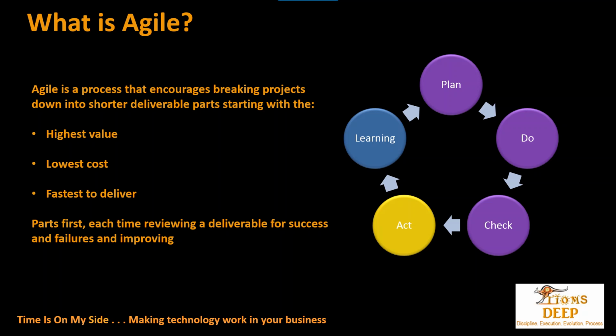That way, if we're building a fairly large project, we don't have to wait maybe years to see any benefit from it. If we can break it down into month by month or even less, smaller projects, each providing a benefit, then they can be online much quicker.